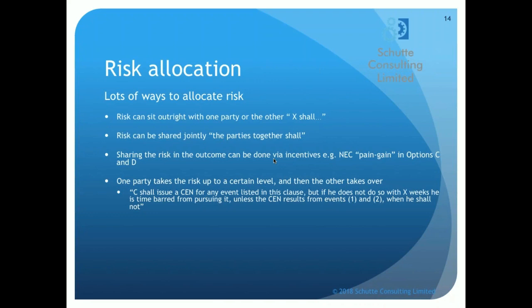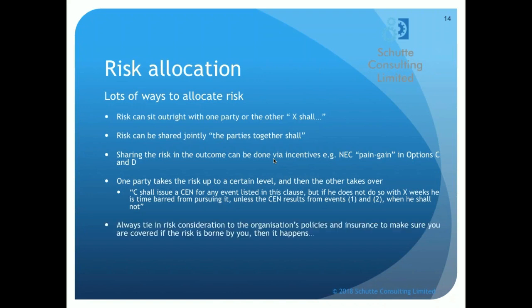But one interesting development to extend that risk sharing is to add the words towards the end of it, unless the notice results from events, and you can put in your events there, when he shall not be time barred. So you're really sharing the risk at certain levels, and then pushing the onus and the risk onto the other party. Maybe something useful you could think about for your projects.